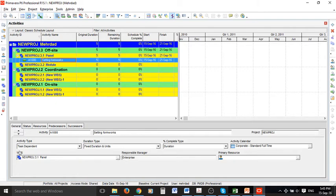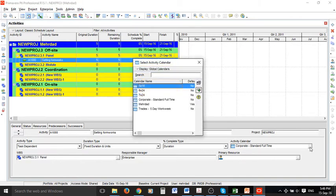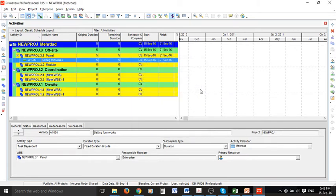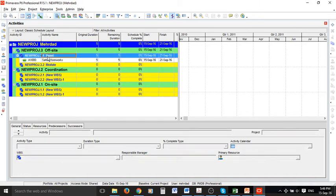The attributes for this activity are shown at the bottom. The WBS item is Panel, which is correct. For the activity calendar, we can change it to the calendar we created. Now everything is set for this one.